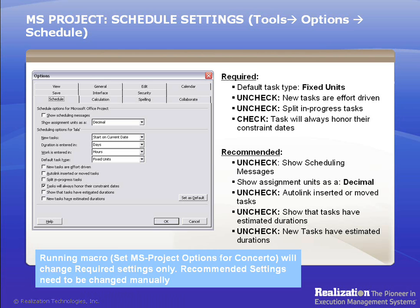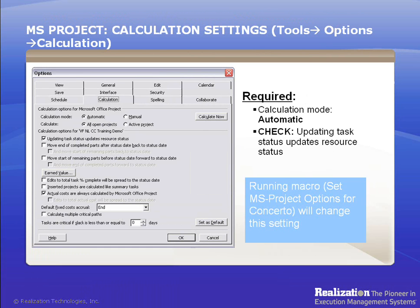Remember the following required settings: 1. Task Type must be Fixed Units. 2. Uncheck New Tasks are Effort Driven. 3. Uncheck Split In Progress Tasks. 4. Tasks are always on or their constraint dates. Microsoft Project's calculation settings will also be changed when this macro is run. The required settings are: 1. Calculation Mode set to Automatic. 2. Updating Task Status updates Resource Status option is checked.